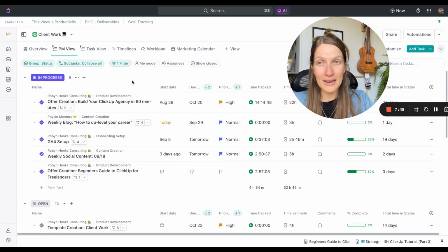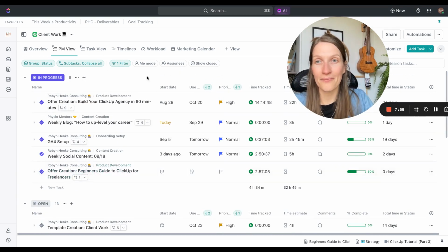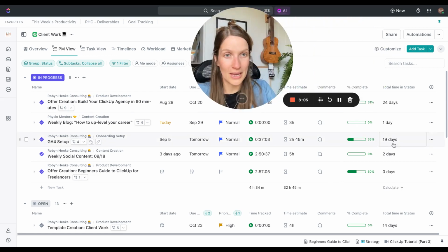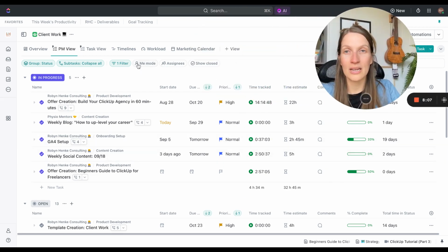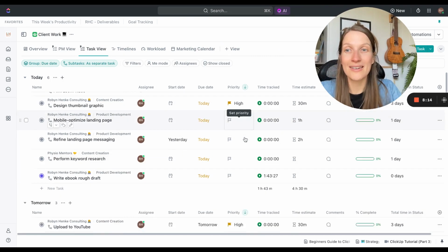But if you're planning to use ClickUp in this way, and I would encourage you to, once the filter comes back, you can use task types to keep things out of here that don't belong here. The PM view is only meant to showcase milestones or, as I said, track deliverables. So we get this beautiful percentage completion, as we talked about before. In my task view, it's the same thing. This should only be showing us real tasks.